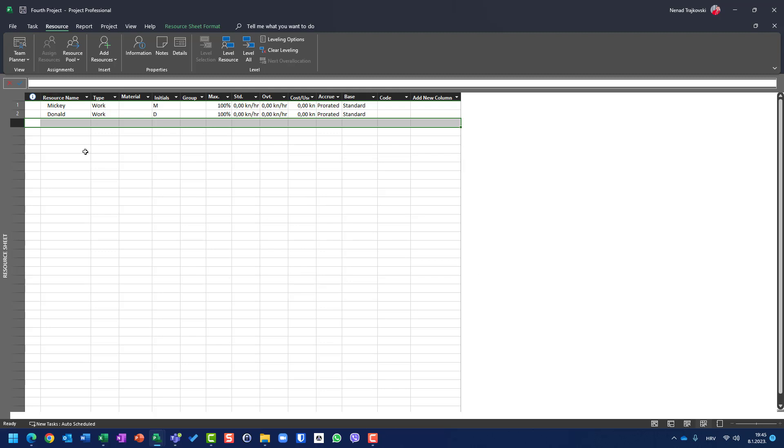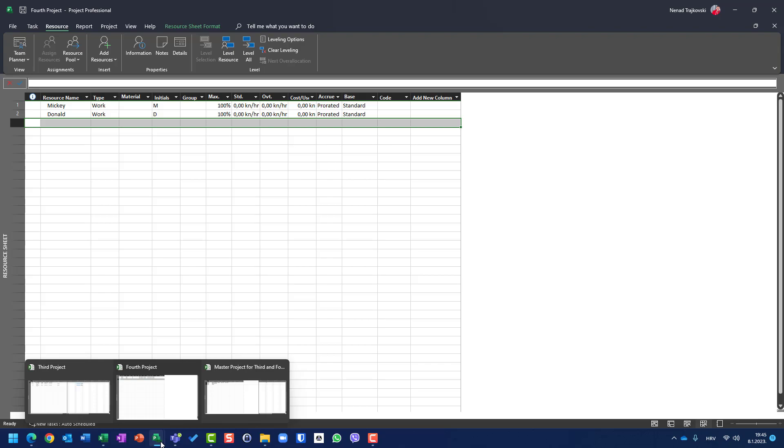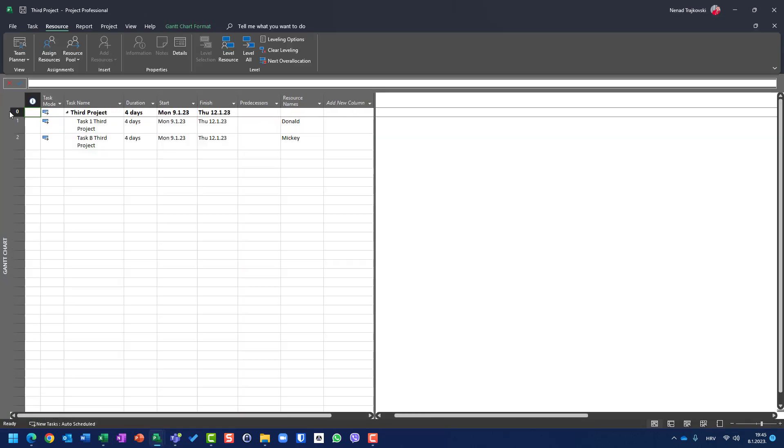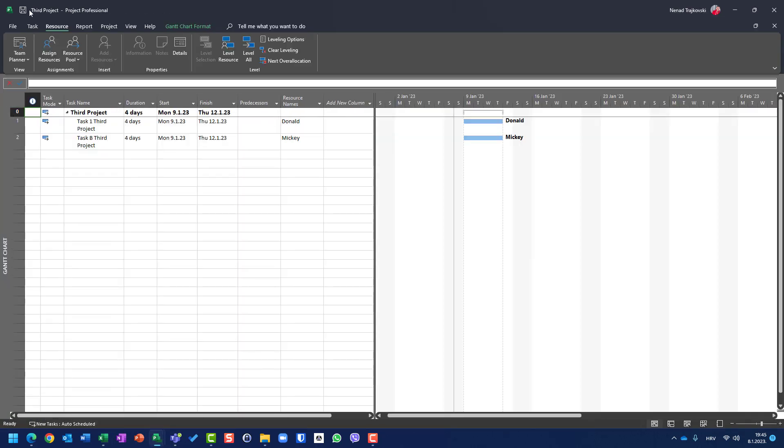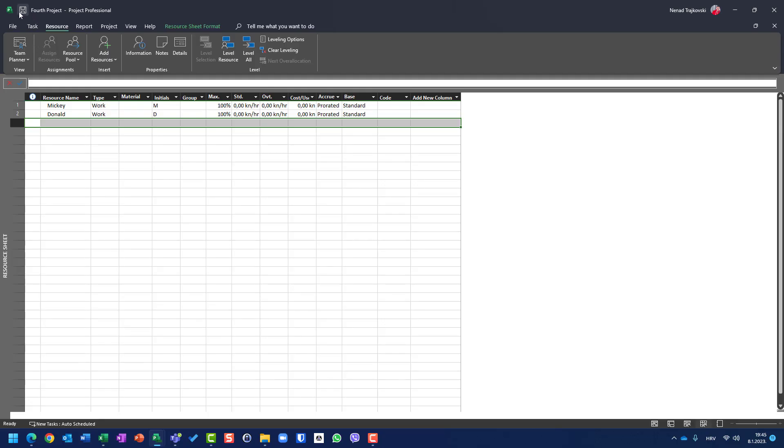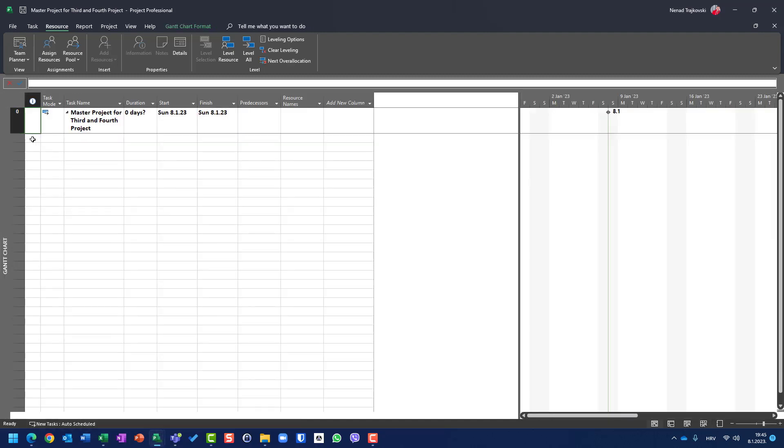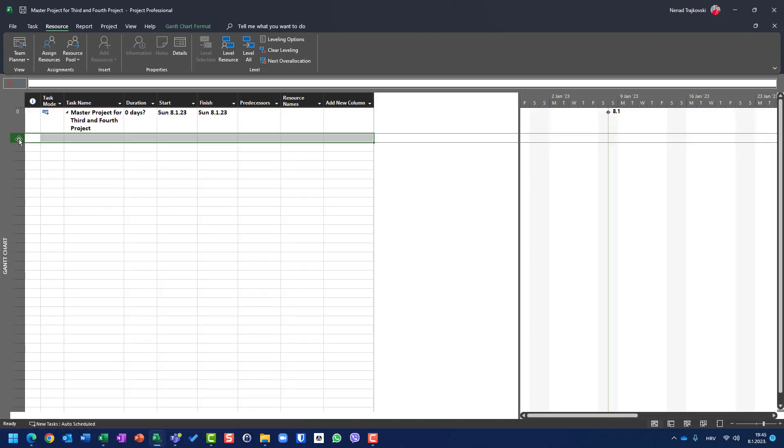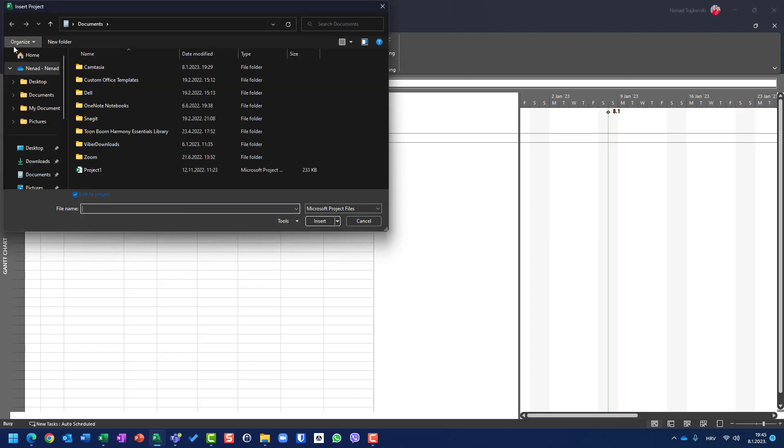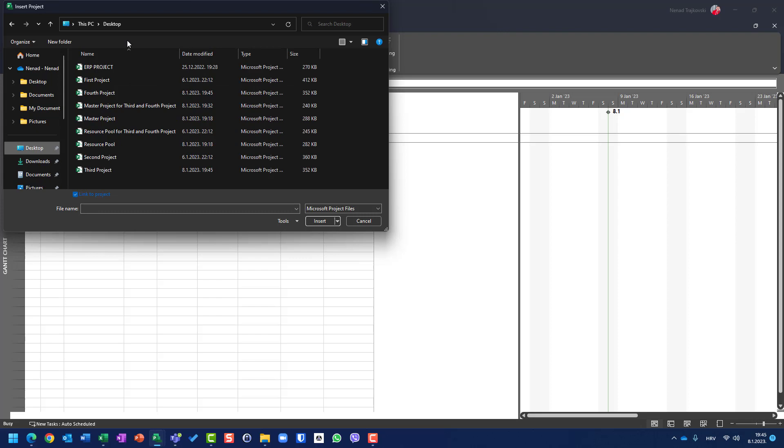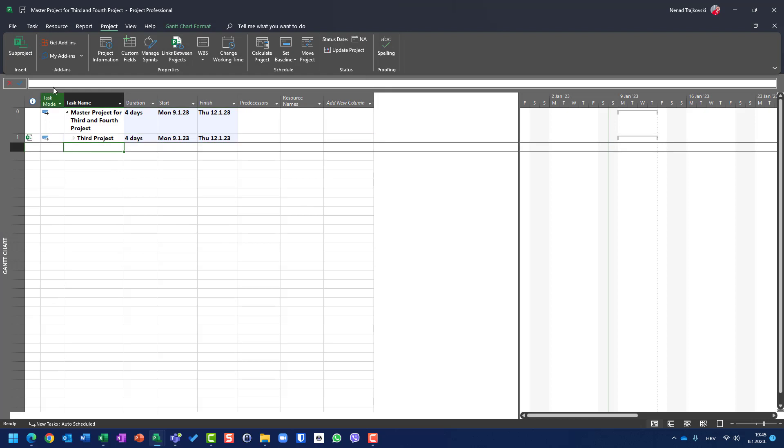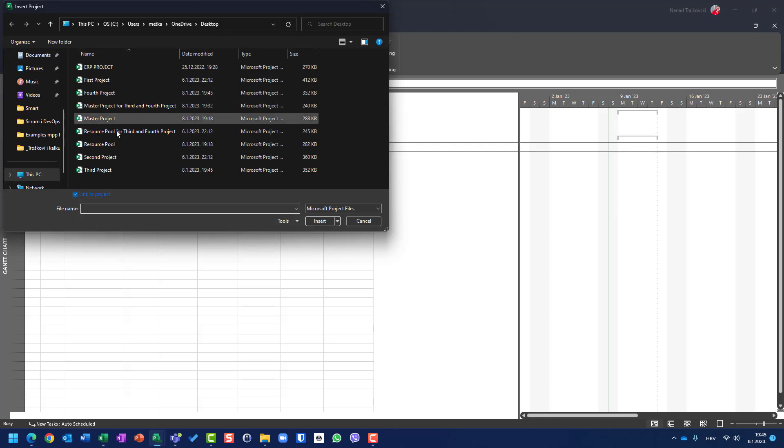Now let me create a master project for third and fourth project. For this purpose, let me be 100% sure that I have accurate data. I will save third and fourth project. For this master project, I will go to Project, Sub Project, and I will go to my desktop and choose third project. Insert. And I will choose fourth project. Insert.